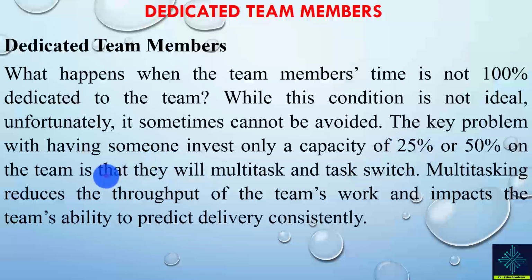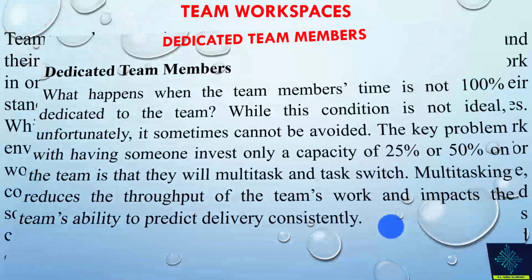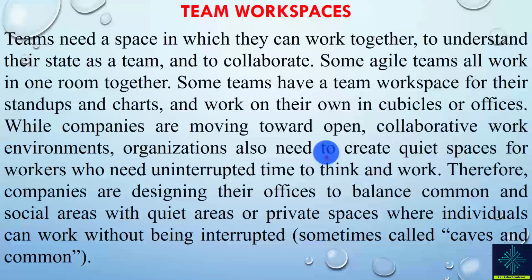on the team, is that they will work and do multitasking as task switching. And multitasking has a problem of reducing the throughput of the team. And this might impact the team's ability to predict delivery consistently and delay delivering the outcomes of the project.